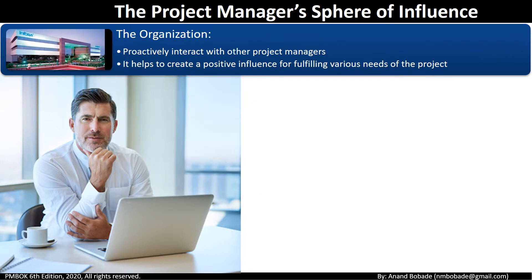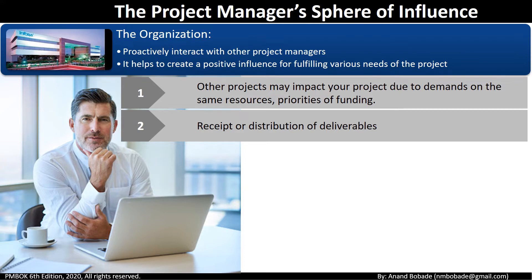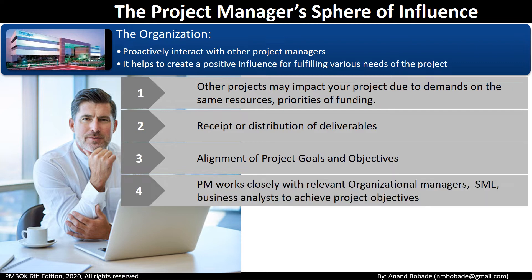The next area is the organization — how the project manager influences the organization. The project manager shall proactively interact with other project managers, discuss dependencies, and share lessons learned, which will create a positive influence for fulfilling various needs of the project, and a successful project will have a positive impact on the overall organization. Other projects may impact your project due to demands on the same resources or priorities of funding. Sometimes, other projects may be recipients of deliverables produced by your project, or your project might receive deliverables that are outputs of other projects. The project manager must ensure constant alignment of project goals and objectives with the organization, and works closely with organizational managers, subject matter experts, and business analysts to achieve the project's objective.